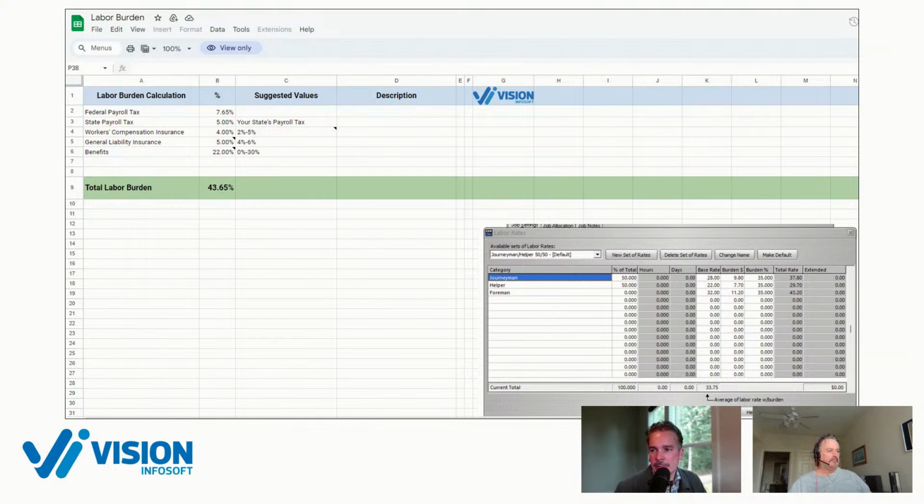Sometimes it's not real straightforward separating additional non-productive labor from the non-productive labor that's already included. Like I mentioned at the beginning, when the program tells you that the job is going to take 1,000 hours or whatever, it's already allocated 30% to the normal non-productive things that are just part of the job: the setup, the cleanup, the breaks, fixing mistakes, interruptions, all those kinds of things are already included. The other non-productive labor in EBM, I'll just flip back there real quick.